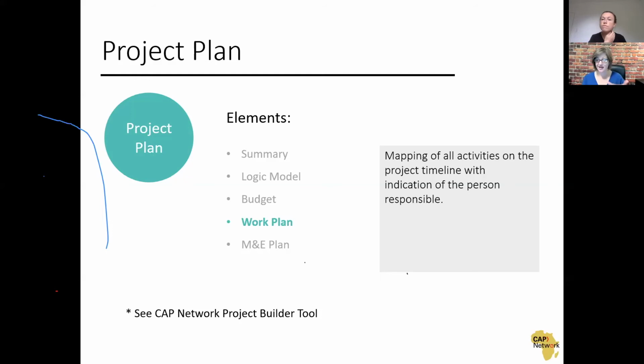Another common small cost sharing piece could be: you're working in a community and a partner or a stakeholder in the community is giving you a place to hold your meetings and your trainings free of cost. So you're able to use that community resource or asset to support the implementation of your project at no cost, but you can include that as an in-kind venue rental contribution to the project.